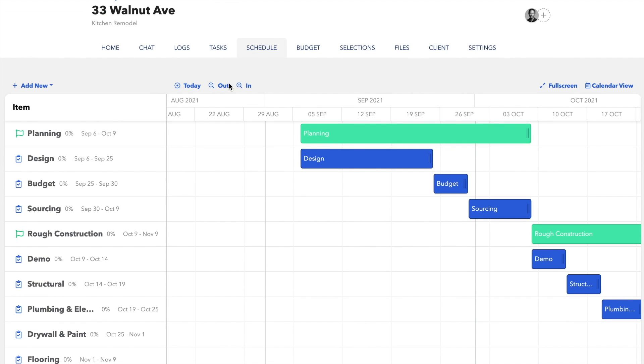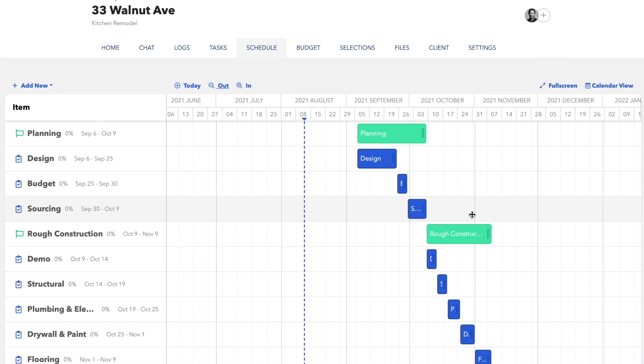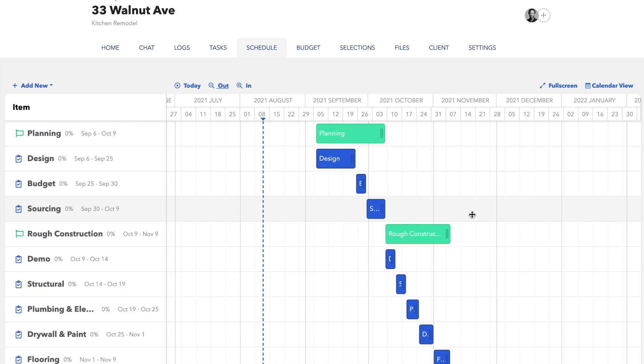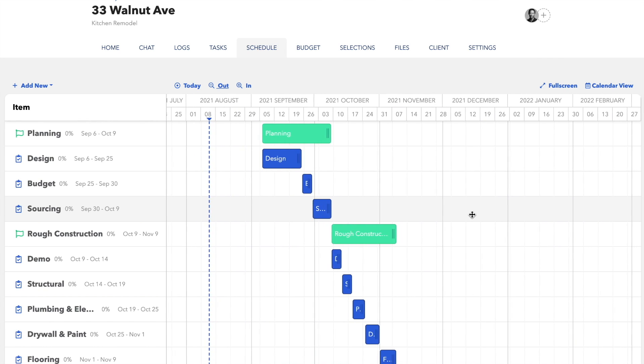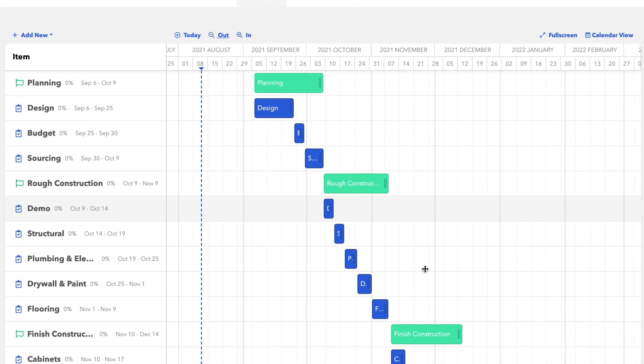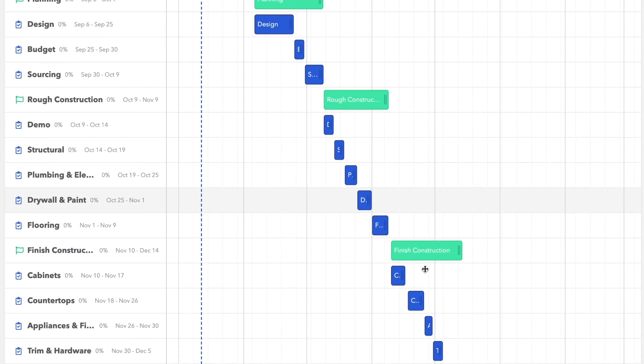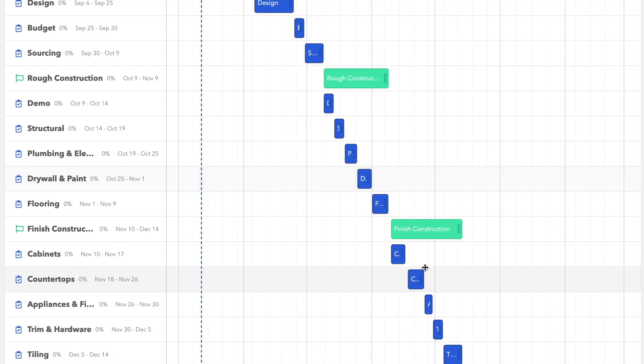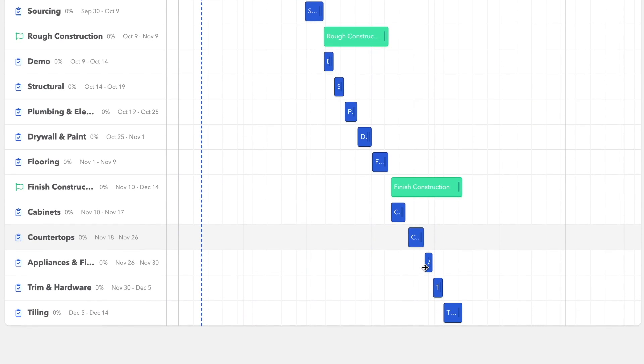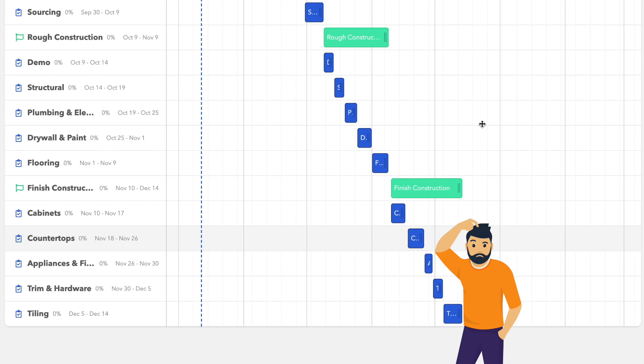But wait, it'll be finished by Christmas only if all goes according to plan, and how often does that happen? Right now, all of these items have no relationships with each other. So if, say, our design process slips a week, you'll have to move everything one by one out a week. So now what?